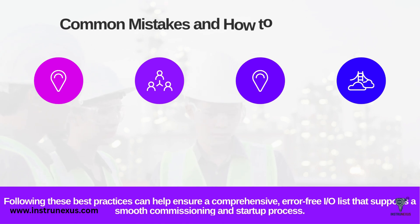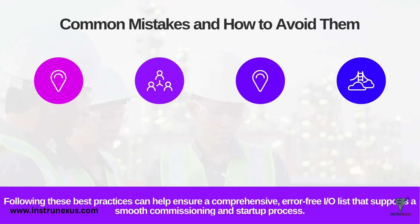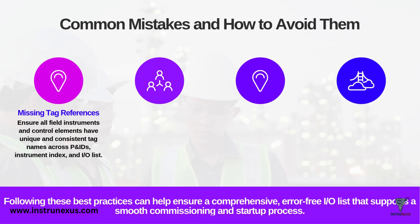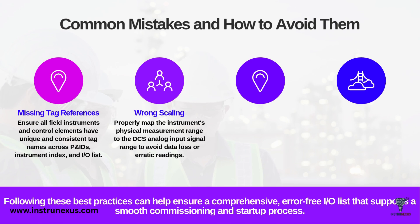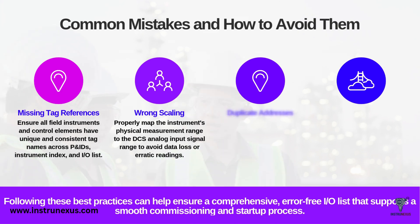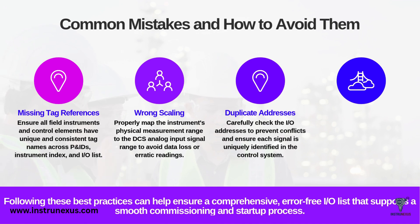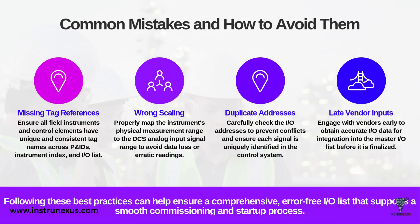Preparing an IO List is a detailed process and several common mistakes can cause major problems down the line. First, missing tag references: a tag exists on the P&ID but is missing from the IO List, or vice versa. The only way to avoid this is to rigorously cross-check all documents. Second, wrong scaling: a classic error where the instrument's physical range is 0-200 PSI but it's entered in the DCS as 0-100, causing the control system to read the wrong value and leading to erratic control and false trips. Third, duplicate addresses: two different IO points assigned to the same physical address, creating a conflict that must be found and fixed. Finally, late vendor inputs: you finalize your list and then vendor data arrives, forcing a major late-stage revision. The solution is to engage with vendors early and demand their IO data before finalizing your own list.